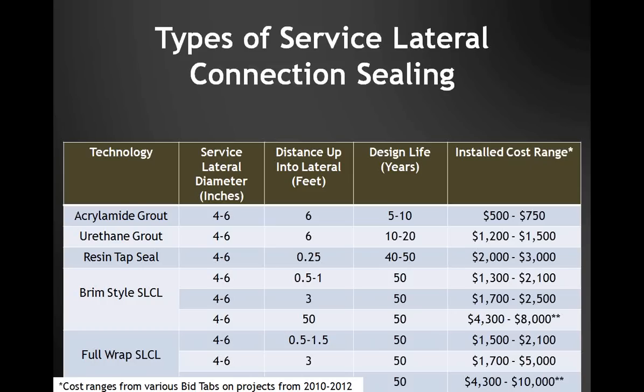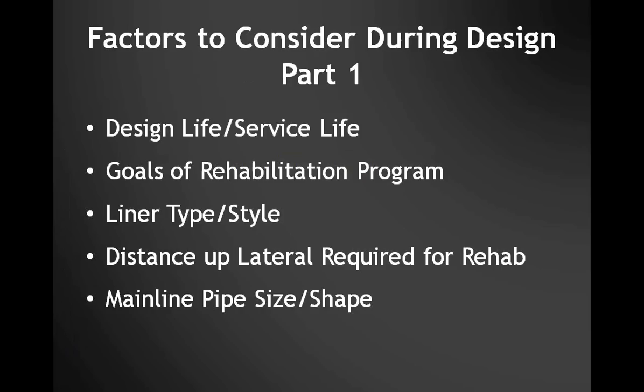Factors to consider during design include the design life or service life of the product, the goals of the rehabilitation program — whether you're under a consent order requiring removal of large percentages of infiltration or simply doing preventative maintenance — the liner type and style including how it's installed and production rates, the distance up into the lateral required, and finally the mainline pipe size and shape. Generally, service lateral connection liners are not appropriate and can't be installed in very large diameter sewers.